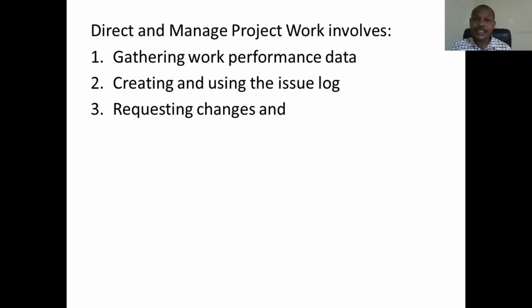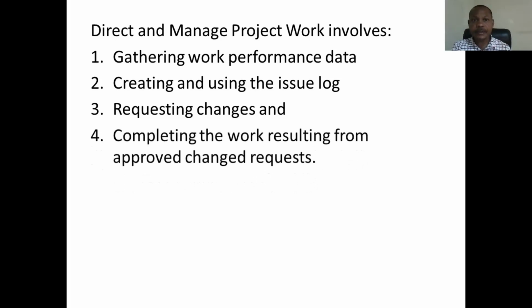And then once the change has been raised, you're going to go through what we call perform integrated change control. Now, what that means is that you're taking the change to the project manager, and he will have to do an analysis of the change. When I say analysis, he's going to evaluate the impact of the change you're requesting. How is it going to impact the project? How is it going to impact the scope? Because the scope has been signed at baseline.